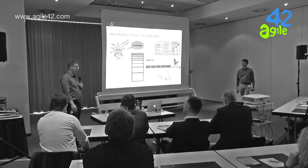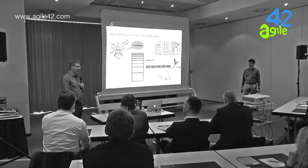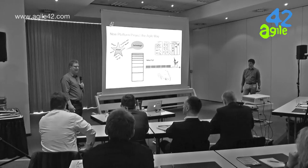this. So this team spent like 3 days on getting the plan. Funny enough, at the same time working with this team, I worked with another customer who apparently also were making a new platform project. The same size, the same number of man-years those two projects had. This other client had taken the traditional approach on forming the plan. They had spent 5,000 hours on gathering requirements, analyzing, writing specifications. This team spent 3 days, that's like 200 hours. So they were 25 times faster to get to this realization.